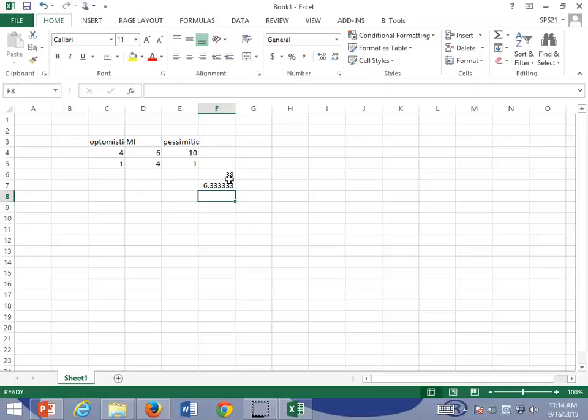So this is a tool we use to get a time for a task. So we can look over our history perhaps and say, what's our worst time? What's our best time? What do we think is most likely? And then we can plug it into this formula. So we're getting closer to that idea of having some way to calculate these task times a little better.